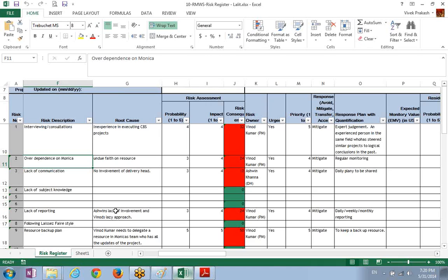And that's why, in my question I asked earlier, you may be happy taking a person matching the skills or even more capable than having the skills. But you must remember that this person has little takeaway from the project. And therefore, despite having high skill, his interest level will be low. And because the interest level is low, his commitment level will be low. And therefore, you will not be able to utilize the skills of this person because you have very little to give him in the project.